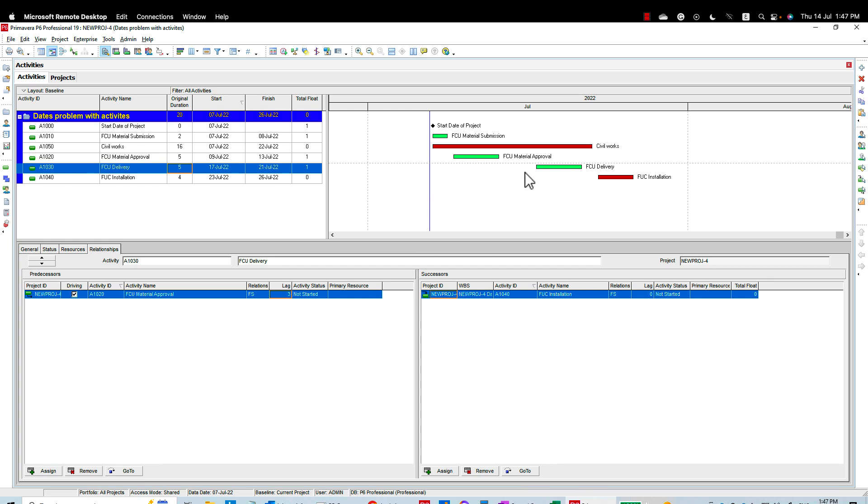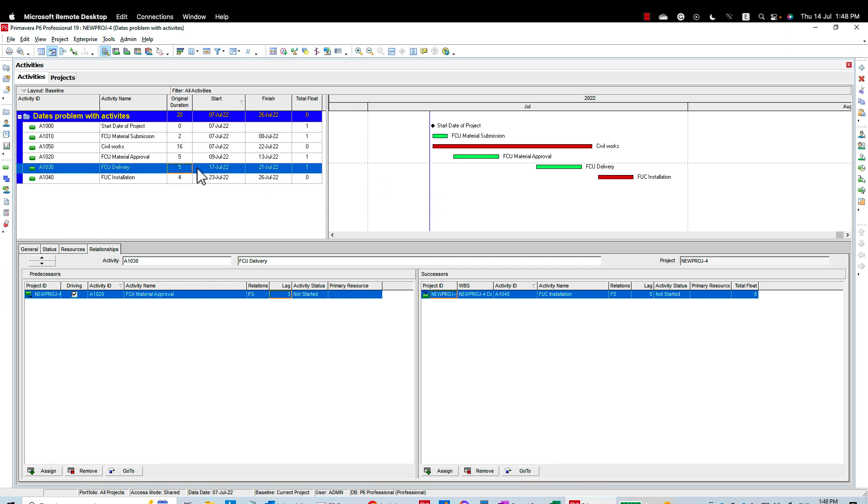You might ask yourself, Hany, why are you doing this? Why don't we just keep it to be delivered earlier? Let me tell you, this will not happen in your project. You will not deliver the material way ahead of time because usually you don't have enough storage places and you need to pay money. And whenever you need to pay money for the material as a construction company, you need to collect it back by installing it. You might have a scenario where you have material on site in your payment. But the point is, the best scenario in the material delivery is to be just on time.